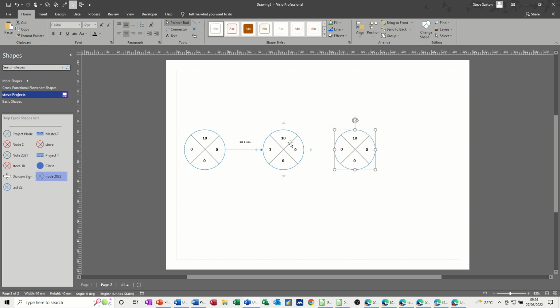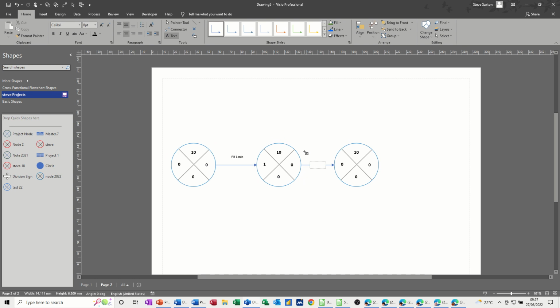So this is going to be boil. I didn't have the connector tool on, so I can put it on now. Snap it in place. Text box. Above that, I don't want the text box on the line, so it's just going to be boil, and that's going to be 5 mins. Back onto the pointer tool. Now while that's happening, so that's now 1 plus 5, so this needs to be a 6. So that's took 6 minutes so far. I'll change the font on this later on.